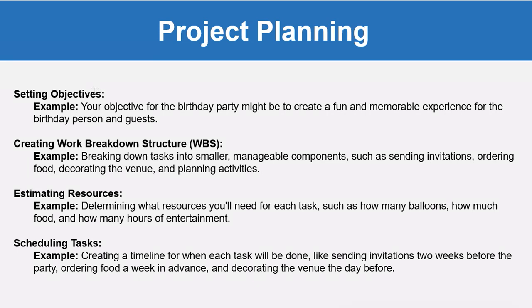Then creating the work breakdown structure, or WBS. The breakdown structure means that you divide the work into smaller, manageable components. For example, you will decide that you have to send the invitations to the friends and family members, order the food, decorate the venue, and plan the activities. All those things are basically part of the work breakdown structure.